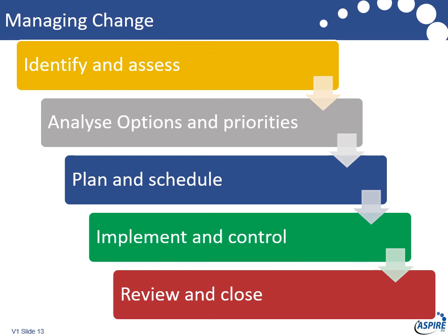Now, there is research that says only 20% of benefits are ever delivered. And largely that's because projects change their scope and quality criteria for what makes their lives easier rather than what's important to the business. So change control, but seeing the holistic picture is really important, particularly in a program, because every project should tell all the other projects about its changes, not just keep it to themselves.